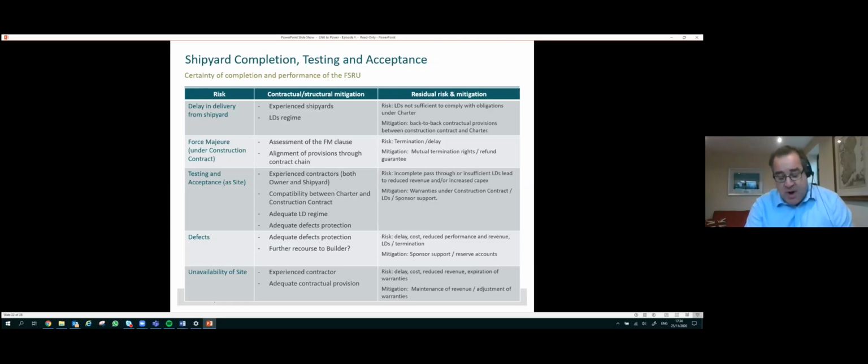But provision will also be required in the event that the designated milestones for the project do not run to the intended schedule. If the FSRU is delayed in arriving at the project site, or the unit fails during testing to comply with the acceptance criteria, so that delivery at site is delayed, the project will expect to receive some level of compensation by way of liquidated damages for each day the unit's delivery to the project is delayed. Now, it's highly unlikely that the level of compensation that the FSRU sponsor will be willing and able to pay will be sufficient to fully compensate the project for the losses incurred, especially if the FSRU is the one element of the project that is delayed.